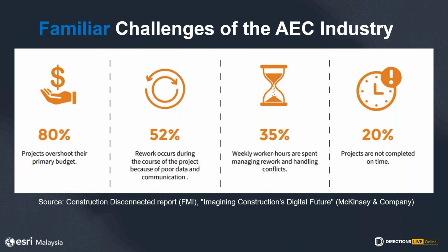According to the Construction Disconnected report by McKinsey and Company, the challenges in the AEC industry are significant, where 80% of projects exceed their primary budget due to unforeseen issues and inefficiency, and 50% of projects require rework, often because of poor data management and communication gaps between the teams, and 30% of weekly worker hours are spent dealing with the rework and resolving conflict, which is leading to productivity loss.